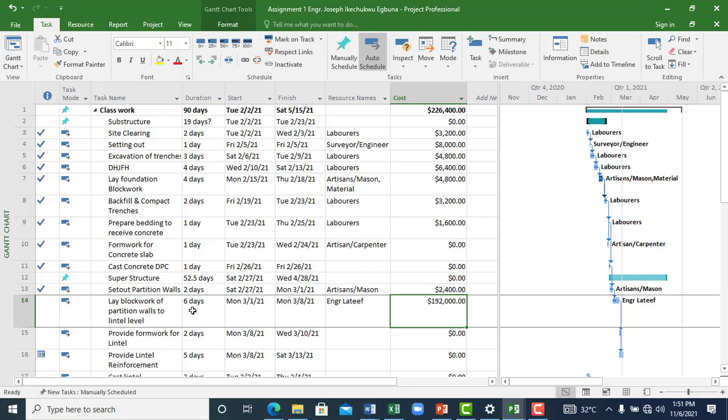Alright, so this is 6 days. That guy is on 4 hours, $4,000 per hour. So it will calculate $4,000 times 8 hours times 6 days. You will have a cost implication of deploying the resource on this column. Alright, so basically that is how. So that is the more important.